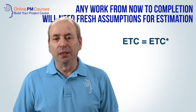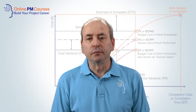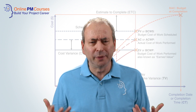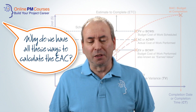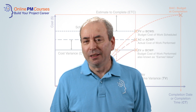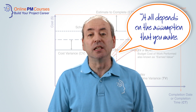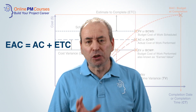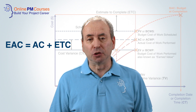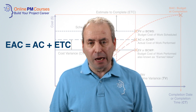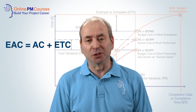Our Estimate to Complete is a new Estimate to Complete based on completely new work. So the question a lot of people might be thinking is: why do we have all this complexity? Why do we have all these different ways to calculate the Estimate at Completion and the Estimate to Complete? Well, the answer is it all depends on the assumption that you make. The calculation of Estimate at Completion is simple — it's your actual cost of work performed to date plus your Estimate to Complete. All we're doing is trying to find an appropriate way to forecast how much it will cost us to do the remaining work, because we know precisely how much work we've done and how much that has cost us to date.